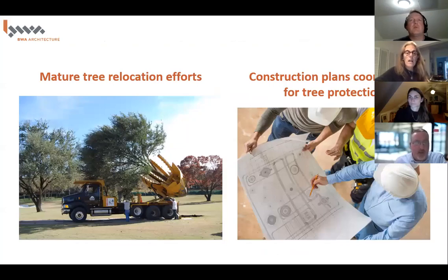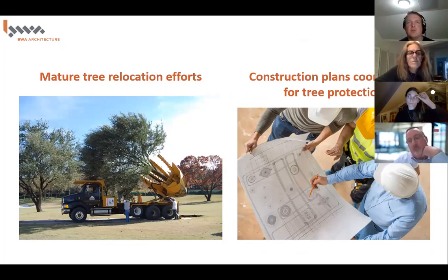So at the meeting with the North Cambridge Stabilization Committee this spring, we were asked to consider relocating large trees. So we hired arborist Carl Cathcart and Matt Fody, a tree relocation specialist. They were both engaged to identify large canopy trees slated for removal that could be relocated on site during construction. Unfortunately, no large canopy trees were found to be healthy enough to be relocated, for some of the reasons I'm going to get to in a minute.